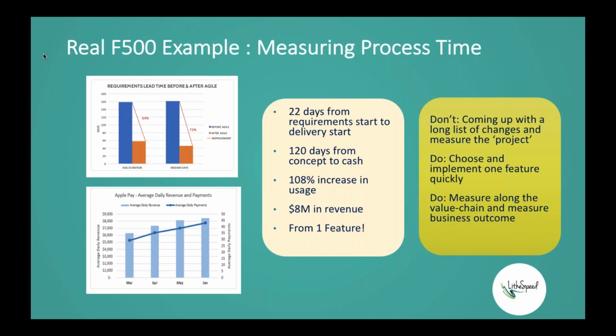So you see in the upper left-hand side here, one of the things we started measuring was business side velocity. We're all used to, I think, measuring the IT delivery velocity. But if the problem is on the business side, you might measure business velocity. How quickly and how often is the business able to get features, capabilities, stories defined and approved so that IT can actually start to develop them? And so we measured that, put some improvements and process changes in place there, and got somewhere between 60 and 70% improvement in the business side velocity.